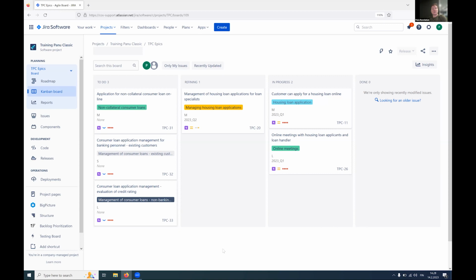As we already mentioned earlier, also, how often do we want to follow up each of these views? What Timo showed earlier was the initiative view where we have all the high-level items. I would expect that there are not many changes happening on that board for the items there. Maybe it's useful to follow it up once every 3 months on some forum.